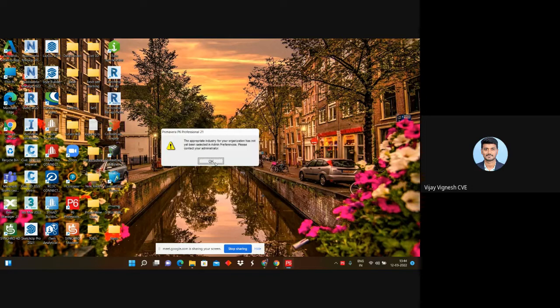Yes, slightly. So the main idea is that OBS is created for the first time when we set up the company. Now we are concentrating on a project. OBS is for the whole company, but one company can have multiple projects at a time. So for each project, we assign a particular person to that activity, under some construction or transportation overhead, using this role option.